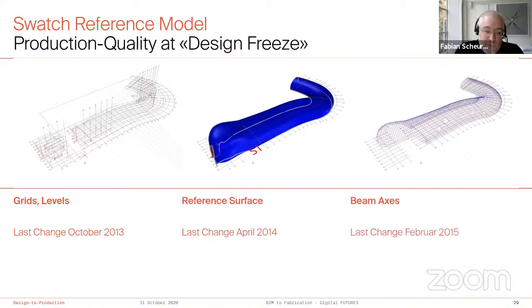And all those models actually were defined pretty early on in the process and haven't changed since the tender stage. So there was a common digital ground for all the planning that happened in 4 or 5 different companies afterwards on this project.